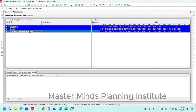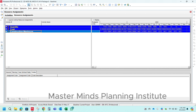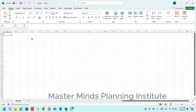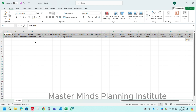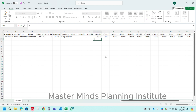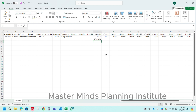Now select the resources and use Ctrl+C to copy. Now open an Excel sheet and paste the data using Ctrl+V. Now use the formula: labor units divided by 260 to convert monthly labor units to manpower.